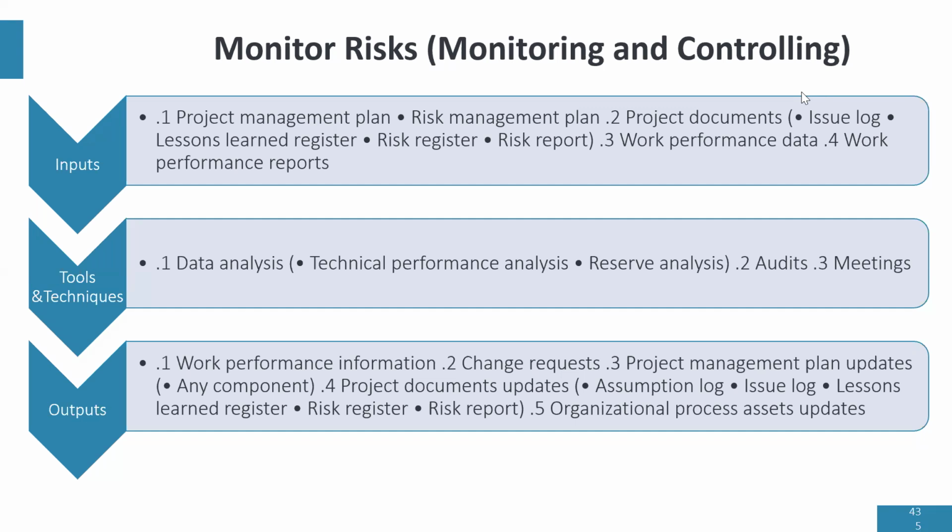And I think that for this process, monitoring risk, COVID is the best example I can give you because everybody saw all their countermeasures, all the risk response. That's what monitor risk is all about, right? You don't just go and sleep because you have a risk plan. You have to keep on monitoring your risk register, looking at changes in risk. A risk can be ranked high, tomorrow it is low, or a risk that was low is now ranked high. That's why you need to monitor risk, because things do not stay static in a project.